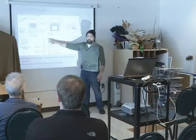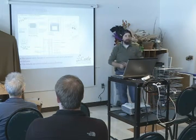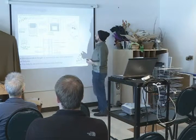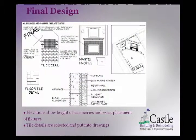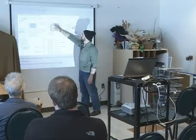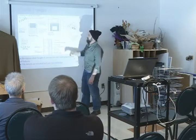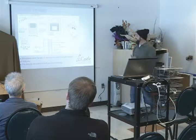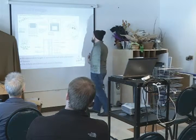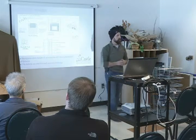But one way or another, details like this are typically used to describe to the city what our plan is on a technical level so that we can get permitting. The other elevations, which are really critical, and you can see it here in a fireplace, also very true in bathrooms, are, well, on this one place, I need a fireplace, I need a mantle, I maybe need a TV or a picture over the top. I want to do some lighting. There's probably a switch related to it. And if you can draw some kind of a picture of that elevation, you're less likely to want to put your fireplace here and realize the electrician came through and stuck an outlet right in there, and now we got to back up and figure it out.